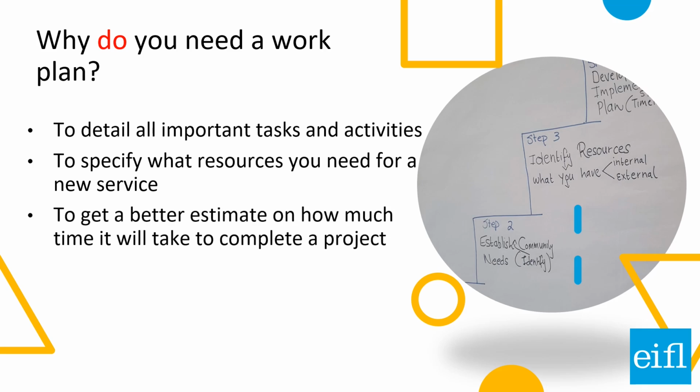Three, helps you to more accurately estimate the time it will take to complete the project and to establish the project timetable, that is, the project start and end date, the order for completing different tasks, and the relationship between tasks. For example, what needs to be done first, what tasks overlap or can happen at the same time.